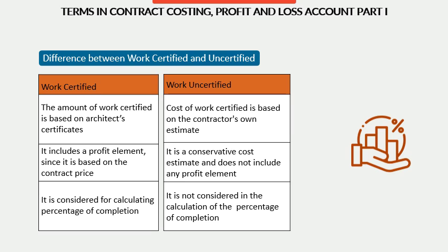Work uncertified: the cost of work uncertified is based on the contractor's own estimate. It is a conservative cost estimate and does not include any profit element. It is not considered in the calculation of the percentage of completion.